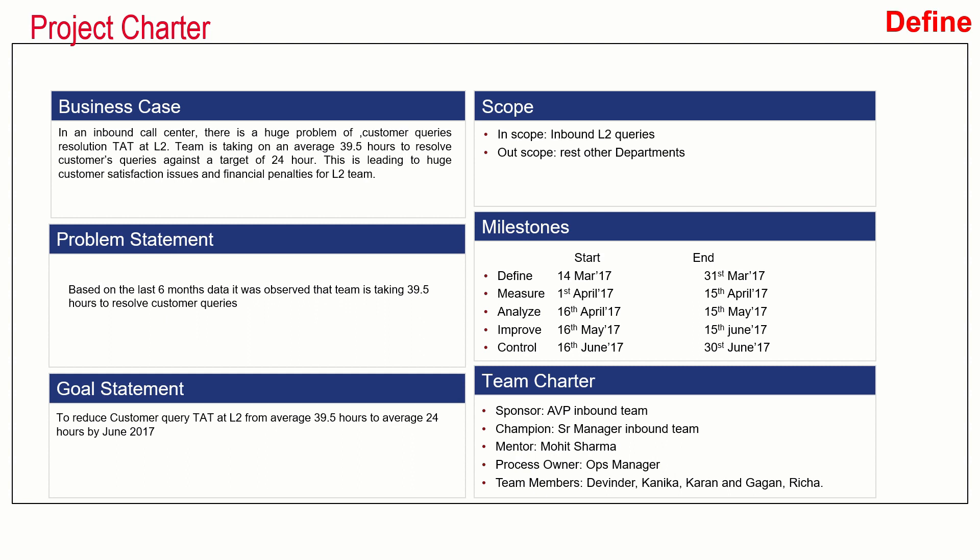The goal statement is to reduce customer query TAT at L2 from an average of 39.5 hours to an average of 24 hours by June 2017. The scope of the project was inbound L2 queries; out of scope was the rest of the departments. Milestones define the overall timeline: the define phase will start on 14th March 2017 and end on 30th June 2017.